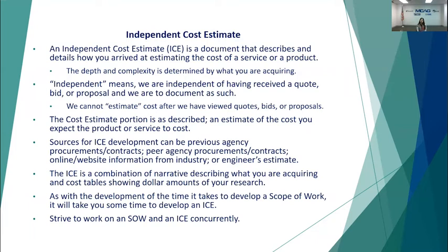And the sources for how you arrive at the development of an ICE can be previous agency procurements or contracts, peer agency procurements or contracts, member jurisdiction procurements or contracts.